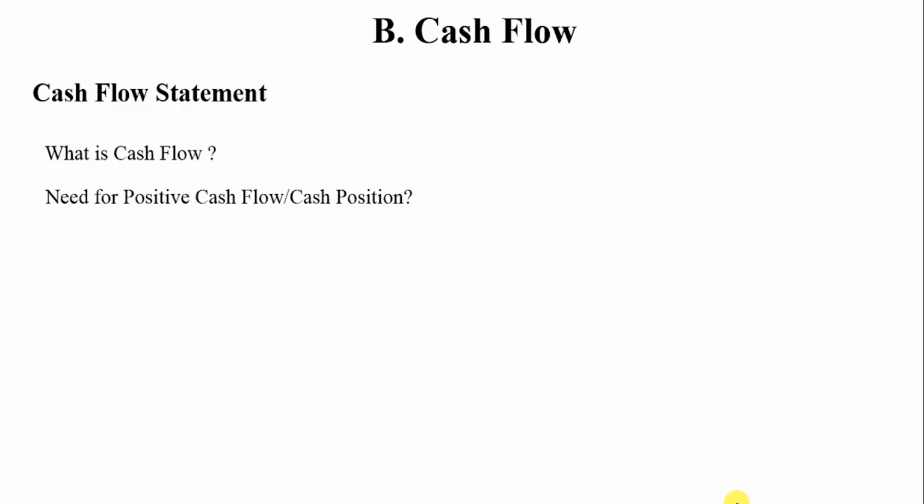You need to have a positive cash flow to make sure that you are not facing a cash crunch, so that your entire team or project is not under pressure to complete early to recover cash from the customers. Most of the time projects are based on deliverables, and when you have to rush the deliverables, there is a great chance of a compromise on quality. So more than the financial aspect, positive cash flow gives the project manager peace of mind that the project is heading on the right track.